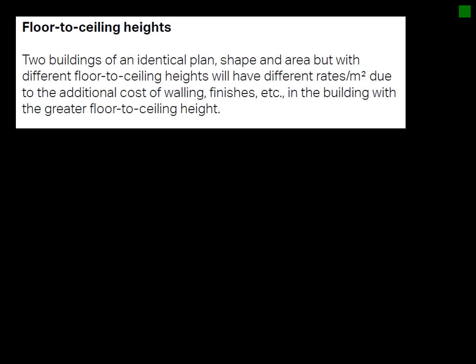Another thing to highlight: your floor-to-ceiling height also has an influence. The rate per square meter may not always be relevant to a new building because some buildings may have a double-volume installation. Your floor-to-ceiling height might be lower or higher, which will influence the cost.